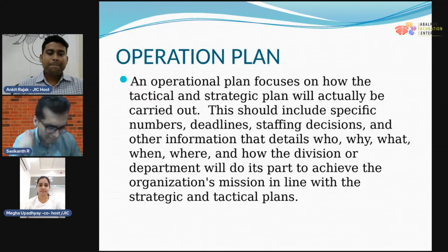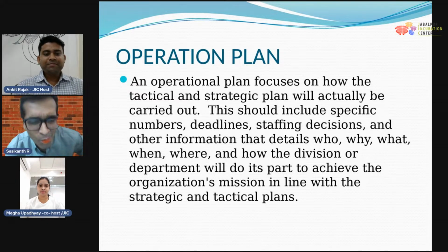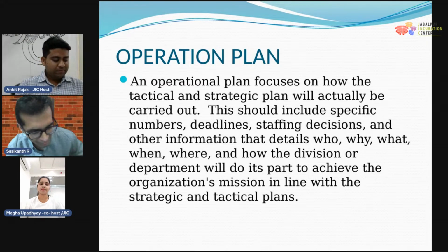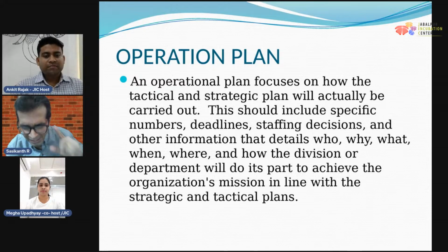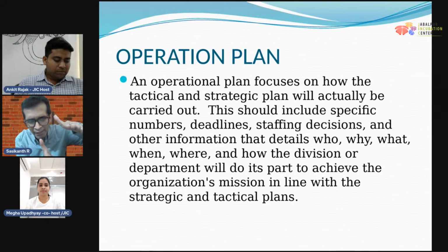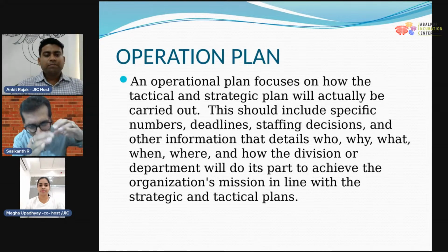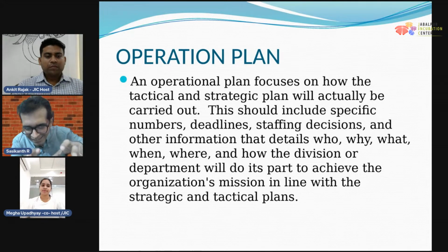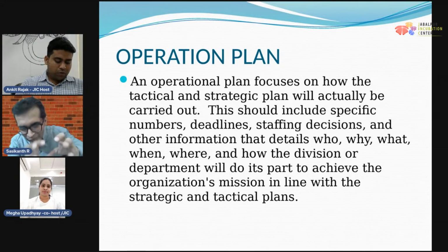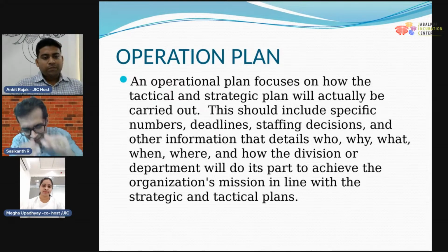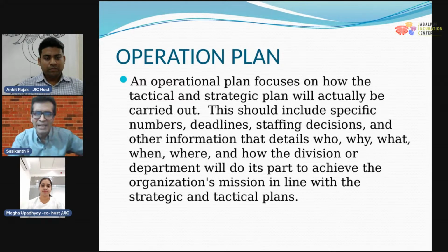Yeah, that's an excellent question, and this is what most departments don't do in large companies and mid-market segments. I'm sure it'll be good for the department heads to plan for risk. If you see my slide on strategic plan, I said milestone factors, success factors, and risk factors. Once you capture the risk factors at the company level, you can break them down into tactical risks, that means department-wise, what can be the risks. And then when you go further down from the tactical risk to the operational risk, you will be able to derive that. For example, let me give you a risk.